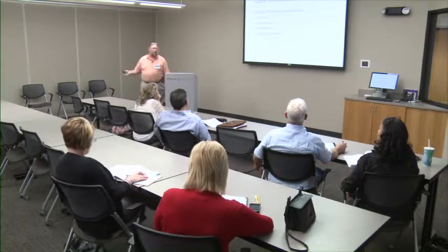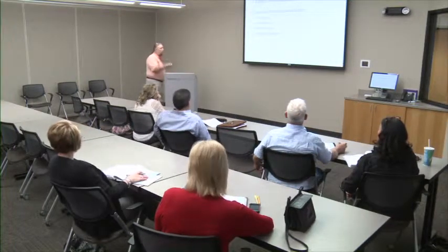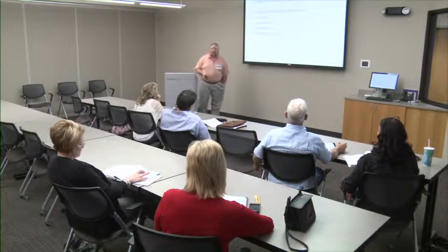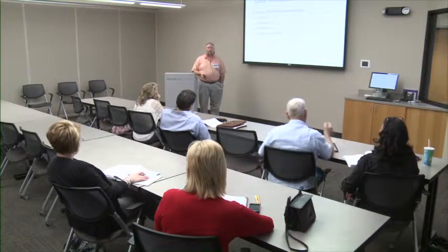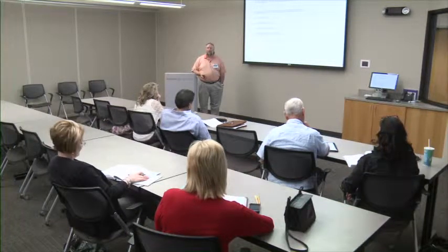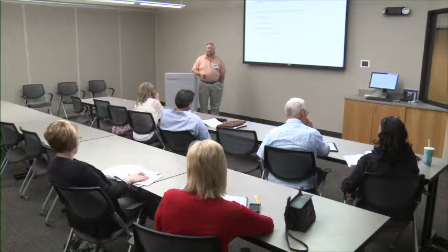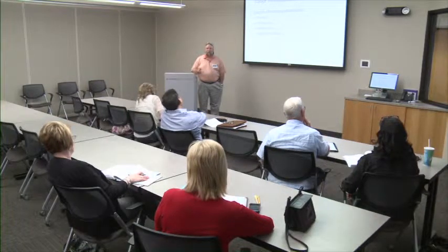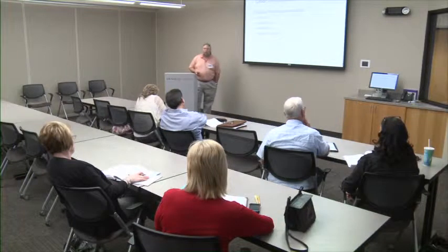Labor and equipment productivity, training, experience, motivation, labor restrictions. How motivated am I to work? If you're working your crews 12 hours a day, 7 days a week, they're not going to be as effective as they were working 5 days a week, 8 hours a day.